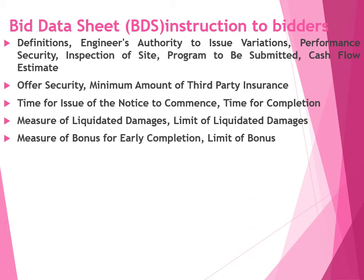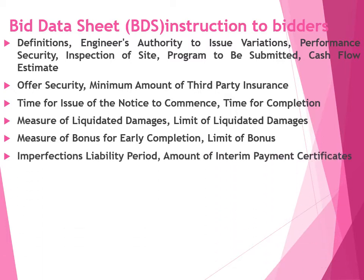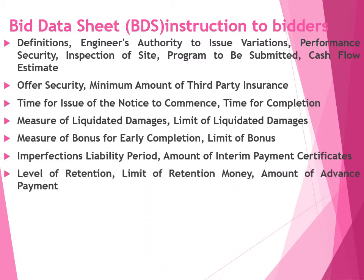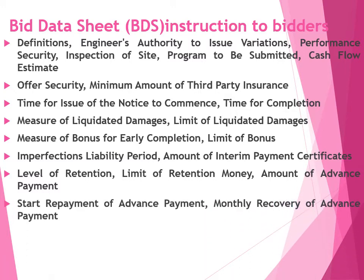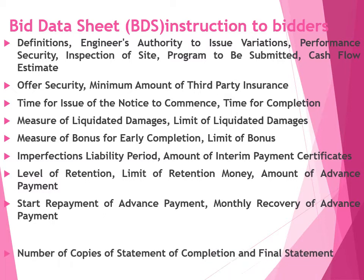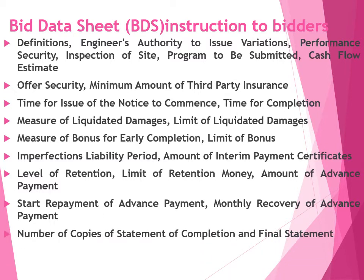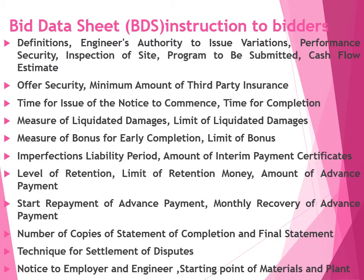Further instruction to bidders includes: time for issue of notice to commence, time for completion, measure of liquidated damages, limit of liquidated damages, measure of bonus, yearly completion, limit of bonus, defect liability period, amount of interim payment certificates, level of retention, limit of retention money, amount of advance payment, stop payment of advance payment, monthly recovery of advance payment, number of copies of statement of completion and final settlement, and techniques for settlement of disputes.